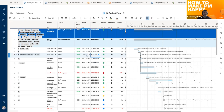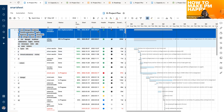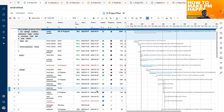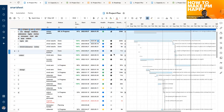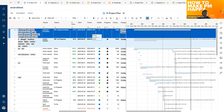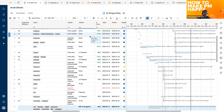Because you're updating these values in the project plan, it automatically calculates the delivery date for business objectives. Right now we can see that for this first business objective, the delivery date is August 1st. If some items wouldn't be ready in a particular time and you make changes to a work item, it automatically recalculates the key result and business objective — and you can see you're already about half a year behind schedule.